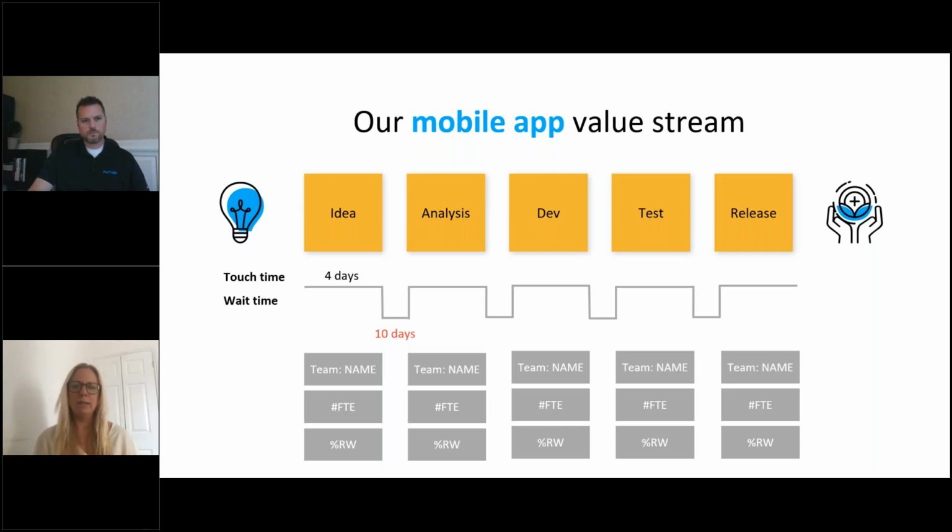The problem with it is that it's not always possible to get everybody to engage. Sure. So you kind of need a backup plan. And the backup plan is to use this process in itself. One of the steps that a lot of practitioners use that we didn't talk about today is, imagine you've got 24 points, when we've only got 5 today. You might see glaring bits where there's like a 38-day wait between two steps. So you literally just circle them and say, right, this is where we're going to focus when we do the future state mapping.